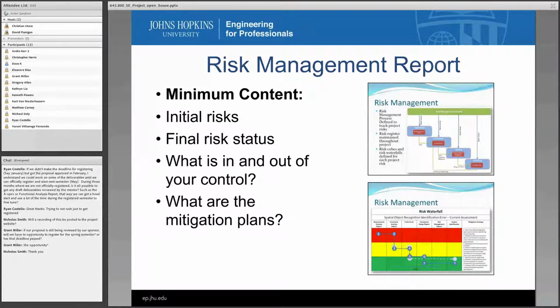Along the way, you've got risks that you're updating. So you're identifying your risks. You're identifying where you're at with the waterfall, as you can see down there, tracking them where you think they're going to go, where they're actually going, what your mitigation plans are, and also what is in and out of your control. That was a big thing that I had learned when I was going through it. There's some risks that you just can't control. It's done by someone else, out of your hands. So don't try to report a risk and be penalized for it that you can't have under control there.